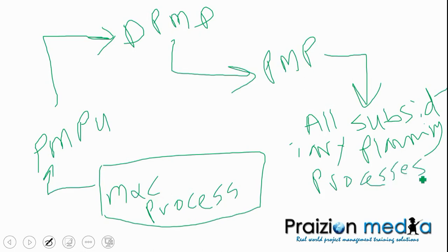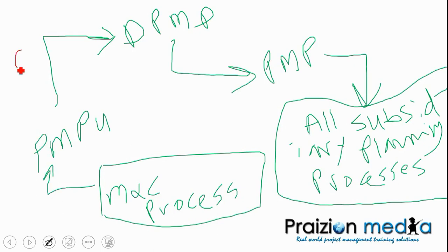Okay, a bit of a scrawled writing there, but you kind of get the idea. Okay, so your project management plan updates as a direct output of monitoring and controlling, that goes into direct and manage project work as outputs from other processes. Here's the key thing. I think a lot of people forget that outputs from other processes is a catch-all for a lot of those updates. Okay? And ultimately, you get your subsidiary plans and other things updated.